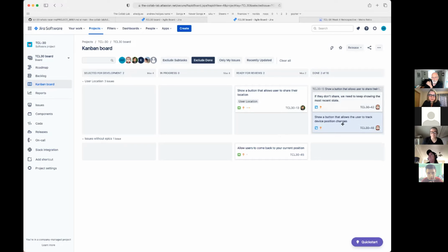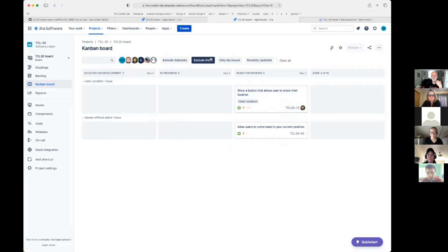So if we just think of these as to-dos, the real thing that we're tracking across the board is the stories. When I did the control chart too, I was excluding subtasks. So just really think of those as a to-do list. Okay, I got that to-do done, I'll just put it in the done column. You don't need a review for that. The stories should be associated with one or more PRs that have to have the group review them. The subtasks can be something that even just one person could say, oh, I need to update this variable. You can move those across the board on your own. So that'll be a little change to things, but I think we'll keep the board a little more clean. It'll be easier to understand what's going on.